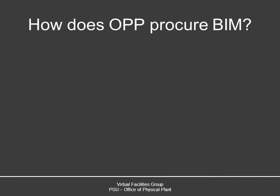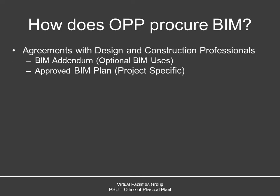After we developed a strategy to implement BIM, we had to establish the process and contracts to procure this from designers and construction managers. We needed to assure that all parties would do the right thing. While an integrated project delivery process was desired, governmental regulations prevented this delivery system. Our task was to develop an integrated approach within a traditional design, bid, build, delivery system.